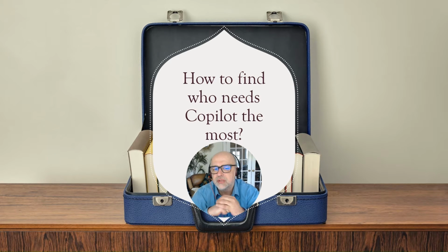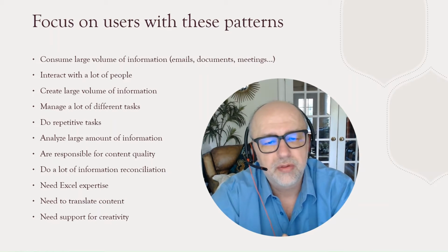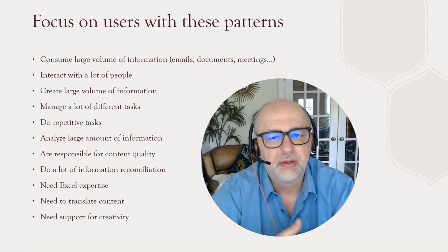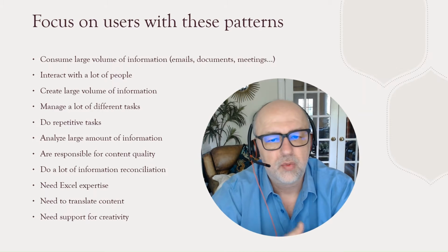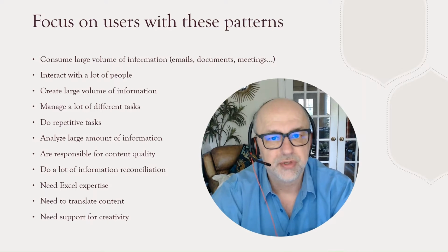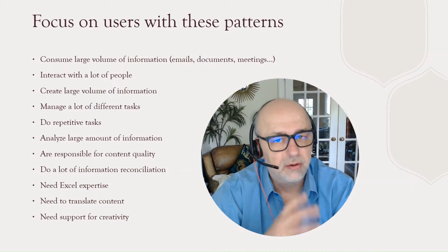So you might want to start to focus on some users, what I call pilot users, to figure out what the experience is and what the return on investment is. For that, you need to figure out who the best users to receive Copilot are. Here are some criteria to explain what you should look for when you're deploying Copilot first. I highly do not recommend deploying Copilot for every user. Try to find a population first, a pilot, and learn from it.